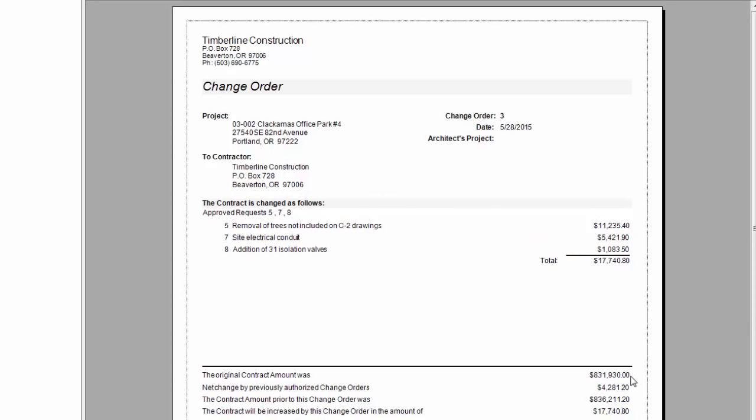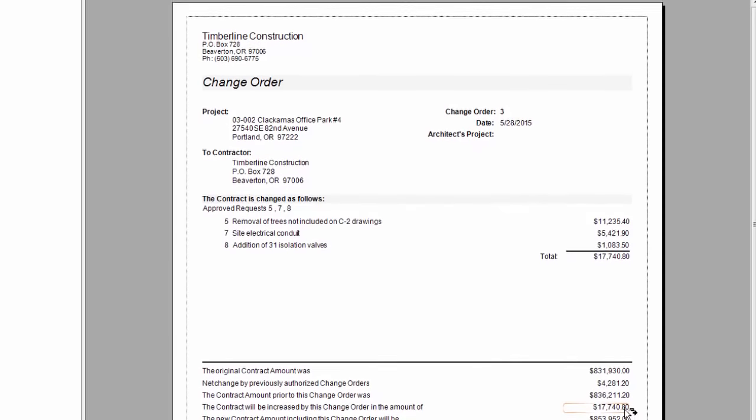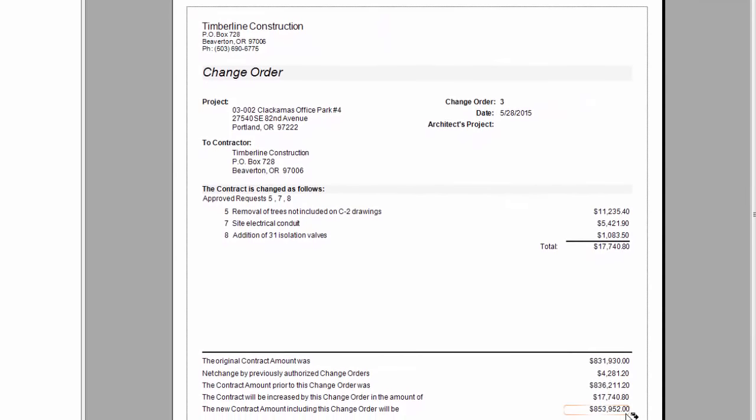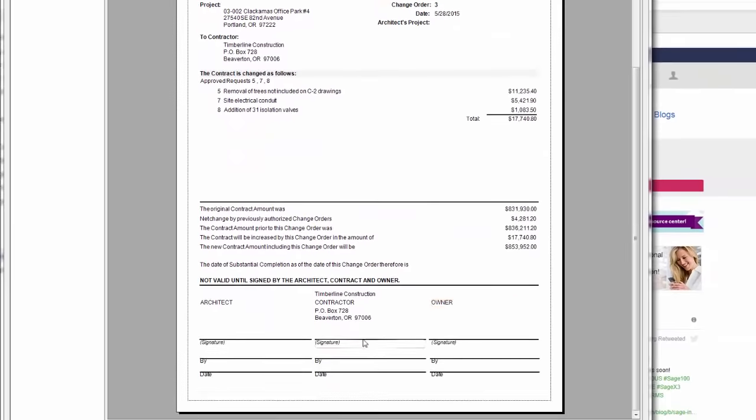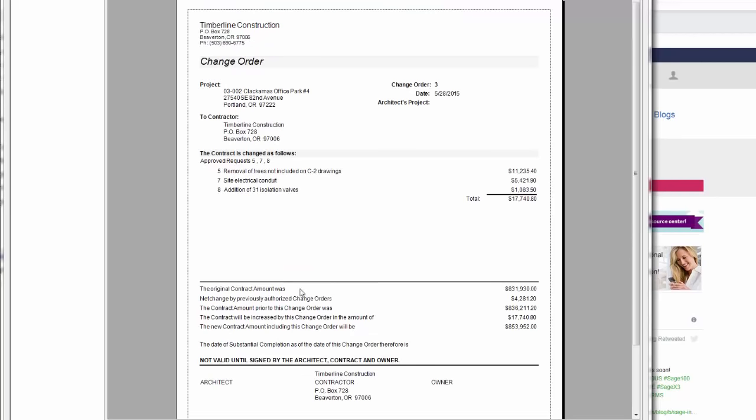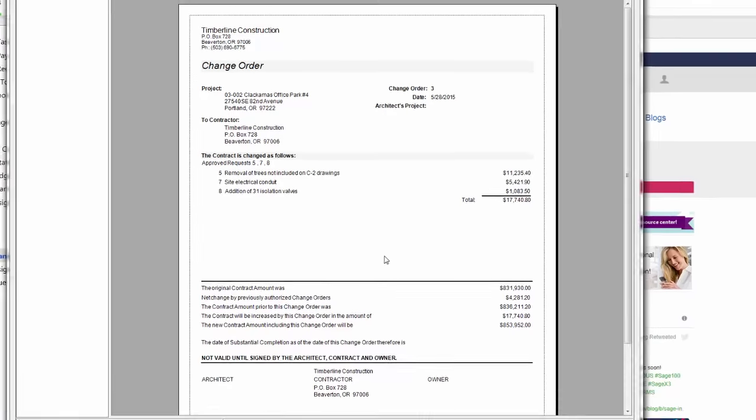So here is an example of one of the canned change orders. Here it has my job, the change order number, my name, the three change requests, and the total price to my customer, what my original contract was, my previous change orders, the net amount prior to these new change orders, the total of my new change orders, and my new proposed revised contract. It also has a place for the architect to sign, me to sign, and my customer to sign. Any of these forms can be changed and modified to look the way your current change orders look.